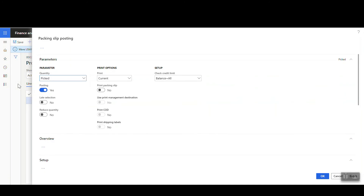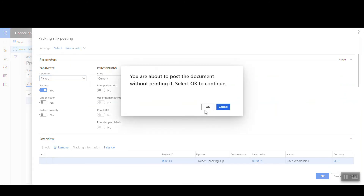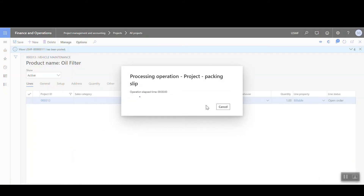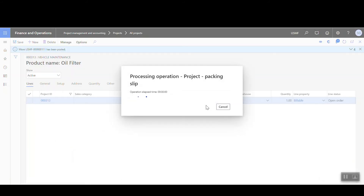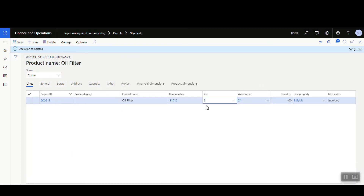That generates our packing slip — confirm OK. So the packing slip is completed. Now, thinking about invoicing: when using the project management item requirement, you don't generate the invoice from the sales order itself. Instead, we go back into the project to create an invoice proposal and post that.